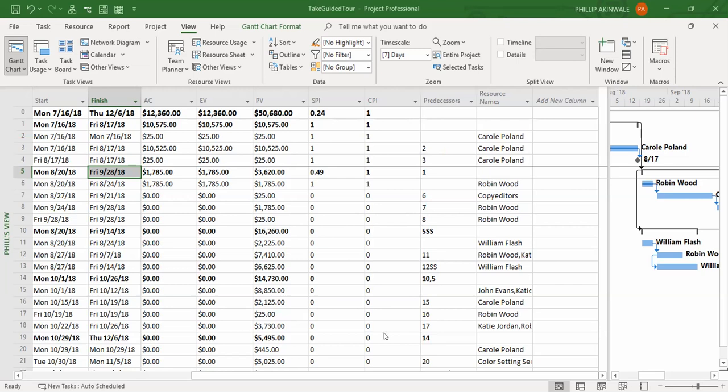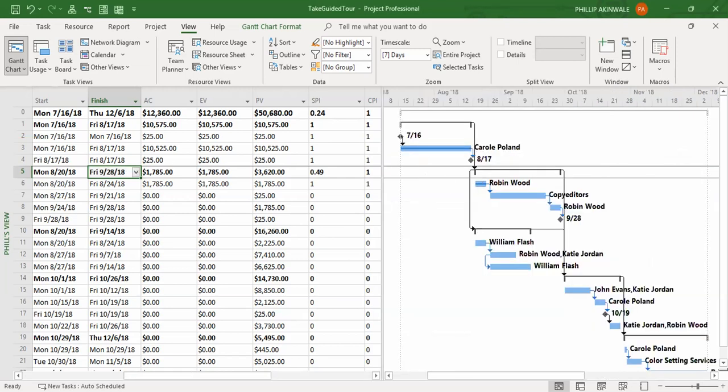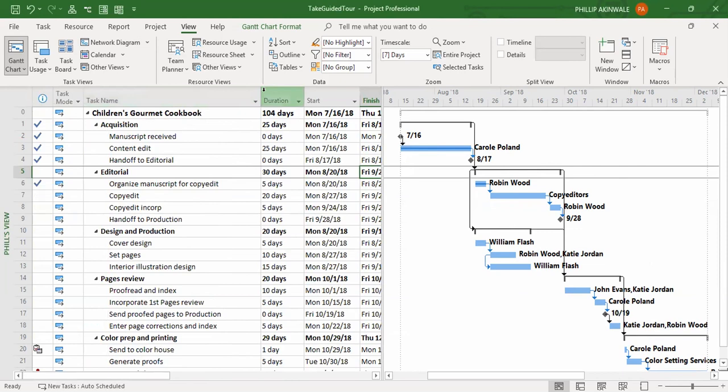Let's move this a little bit. Right over here, you can see in the Gantt chart view these are activities, and it's showing you those relationships, those finish to start relationships. For example, this is a start to start relationship. You see that one there? That's a start to start relationship. And this is what you do in sequence activities. After sequencing the activities, you estimate the activity duration. Pretty much in this column right here, you estimate the duration. How long will an activity take?